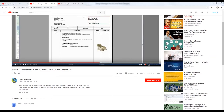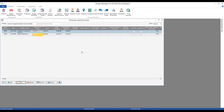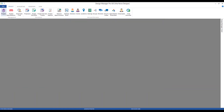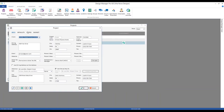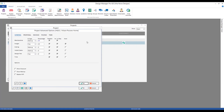Another method of managing freight is to add freight to each merchandise component calculated as a percentage of the price of the merchandise. Doing so prevents us from ever missing freight billings and distributes a uniform freight across the project, so you can very accurately project your profit on freight. Let's go back to our Projects window, check out our Hilson Pocono Home, go to Defaults and Advanced, and notice a few changes: freight is now set for a pricing model of fee at 10%.